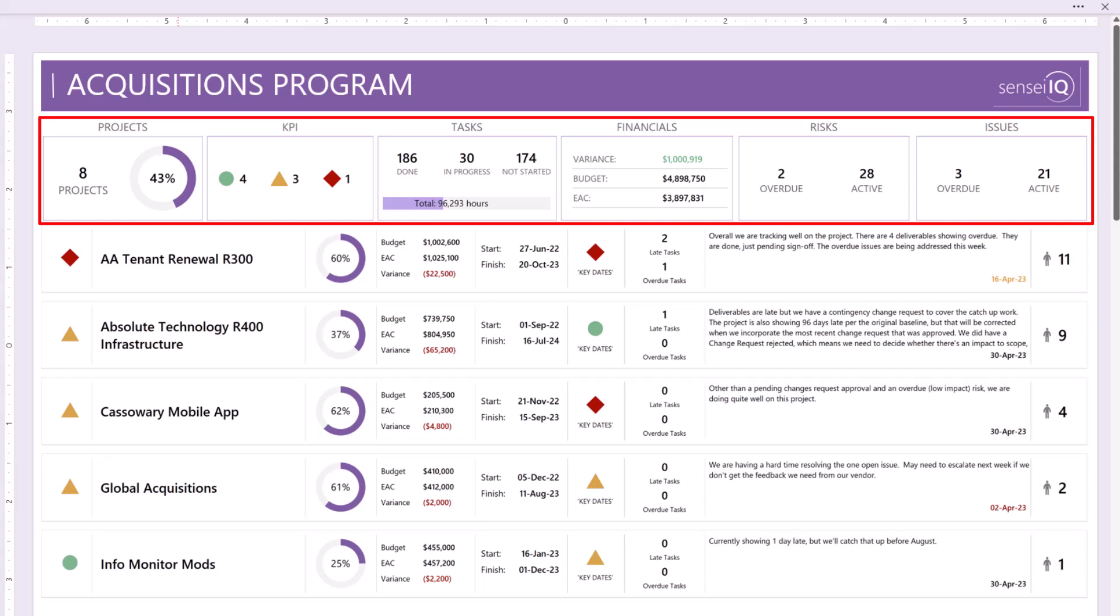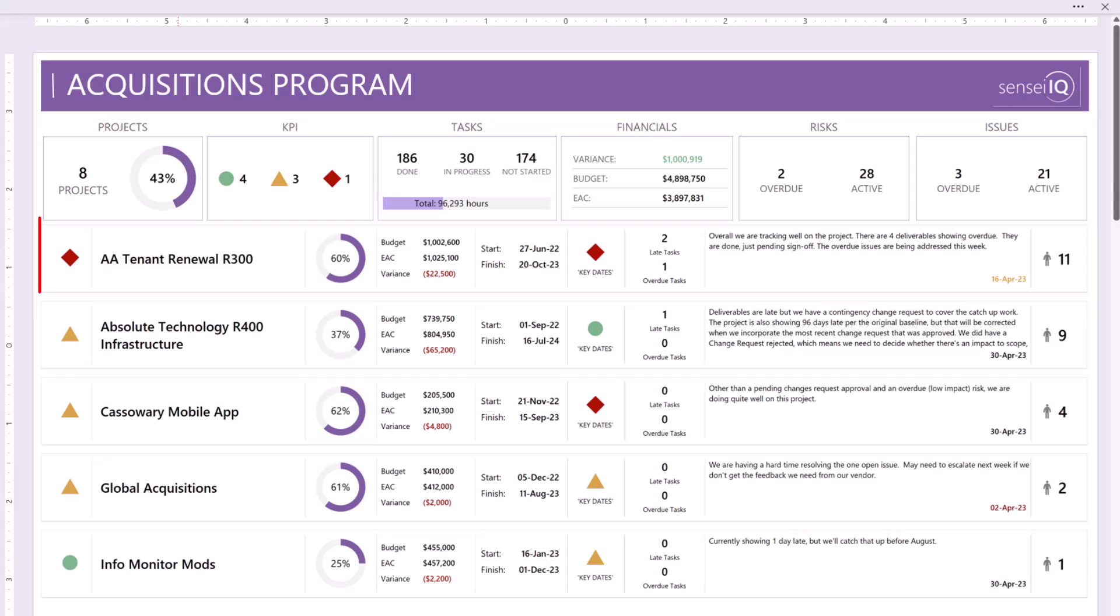The Financials card shows total variance, budget, and estimate at completion. The Risks and Issues card shows a count of overdue and active risks and issues.